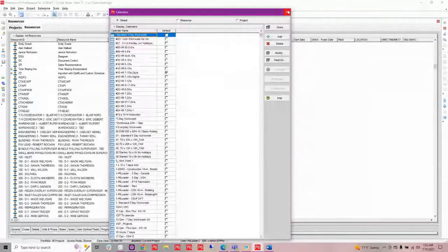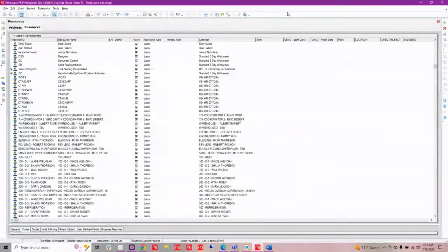Yeah, and the worst thing here is, let's say I import and I overwrite. I could mess up Sue's schedule and she doesn't even know I did it. So that's even worse. And we've had clients in that situation, because a standard 5-day work week in Canada has different holidays than the holidays in the USA where Sue is. So this is another hugely important reason why we built Scrubber, so that you can clean this stuff up and make sure it comes in properly, with no bad, horrible surprises.